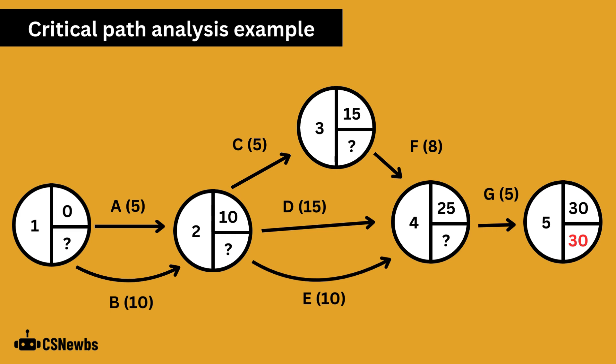Now we work backwards through the diagram to work out the latest finish time. The latest finish time of the final node, number 5 in this example, is always the same as its earliest start time, so it is 30 days.